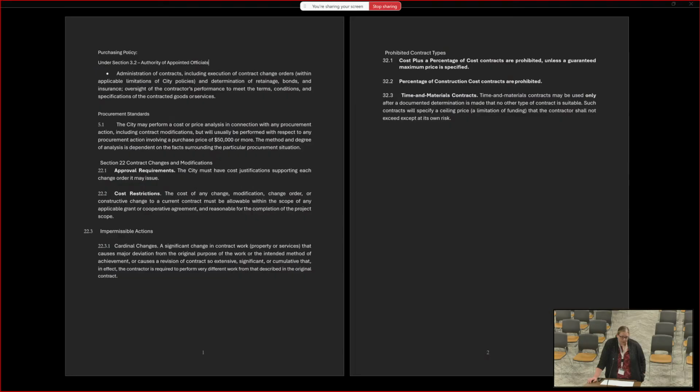So 32.1 factor. It's not a cost plus the percentages. So usually that's materials times a 10% increase, and that's all you get. For the bid price, where the RFP or the change of scope, I believe, was actual costs of what it would cost the contractor for that.